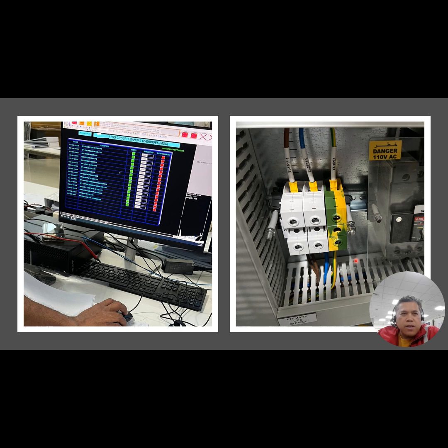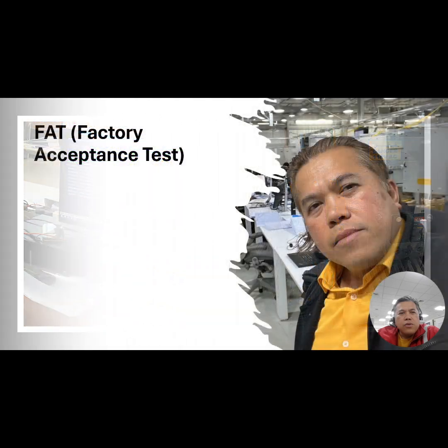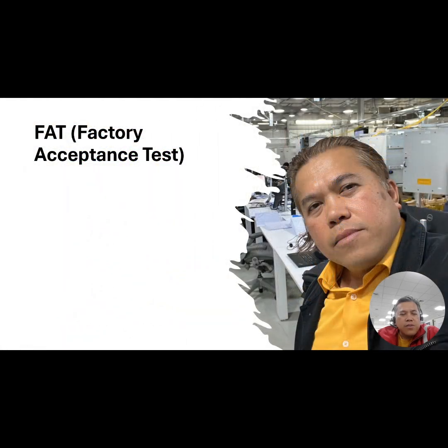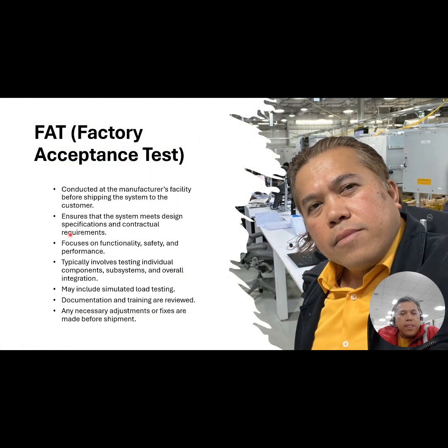Basically, this will be tested at the supplier or vendor. Factory acceptance testing should be conducted at the manufacturer facility before shipping the system to the customer.